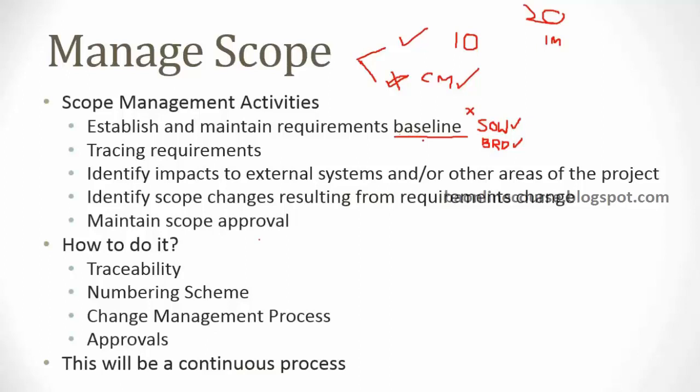And at a later point also, the customer could come back and say, I want changes to this requirement, right? So let's say when you're doing the development, or maybe when you're testing it, the customer would say, you know what, I don't want it in this way, change the way in which this feature should work, right? Then you can always refer to the BRD and say, you know what, we agreed in the BRD that this is how it would be done. Now if it wants to be changed, then it has to be a change request.